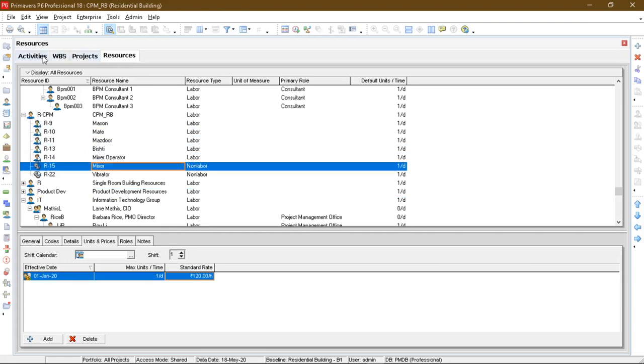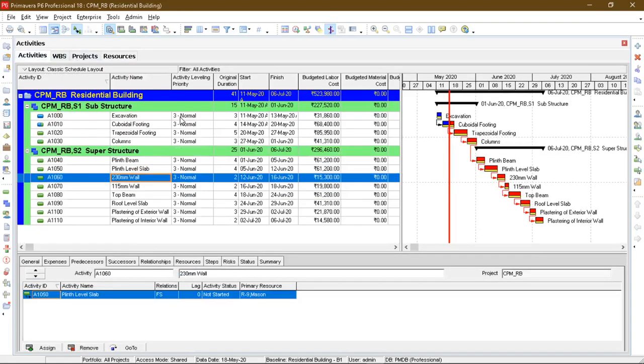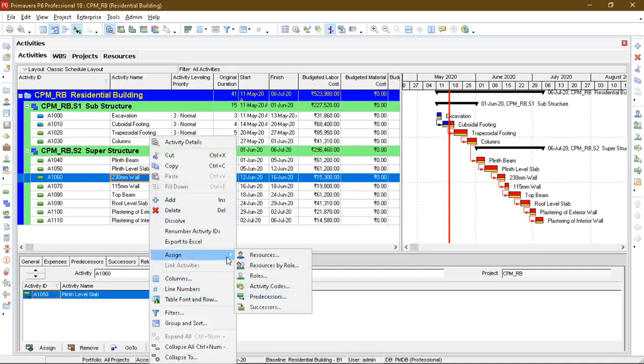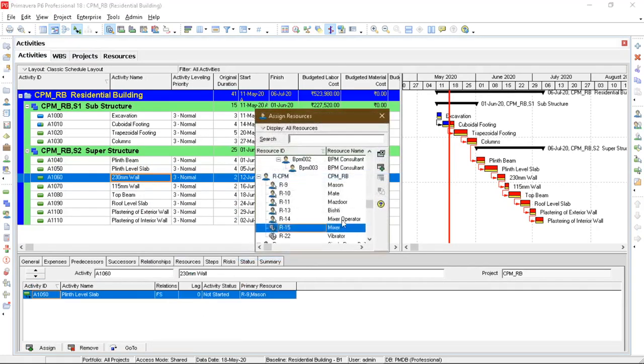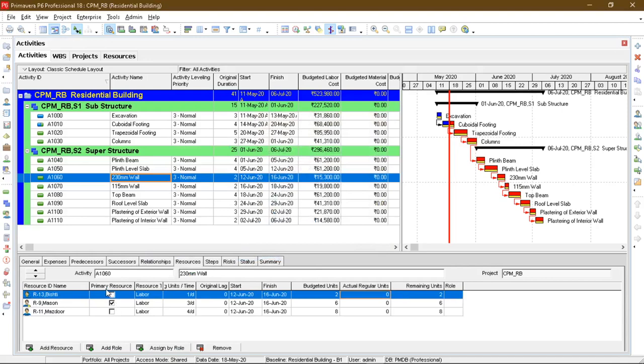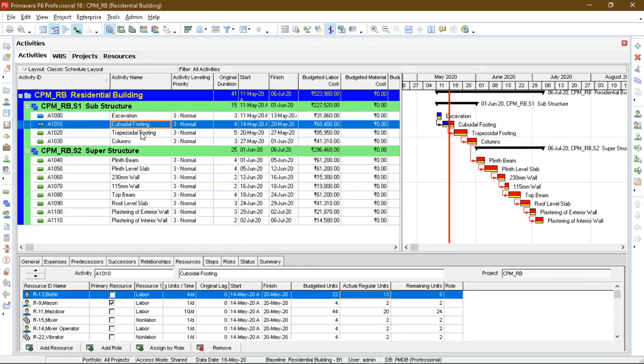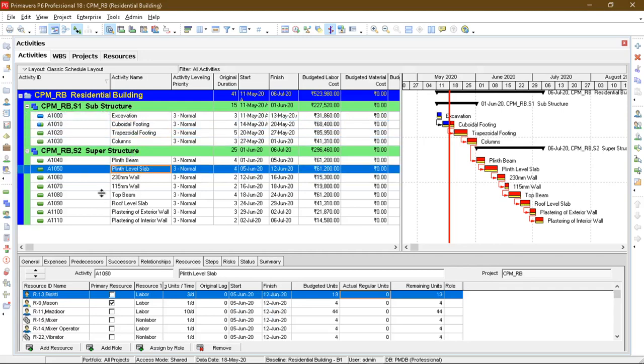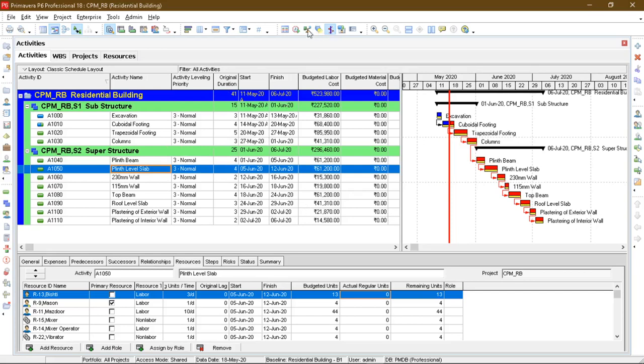The resources: mason, mazdoor, mistri, 120, 80 and so on. Then coming back to activities, I have assigned the resources using this assign resources key. As you can see in the resource tab I have assigned resources for each activity as per the problem. Then after assigning, I have defined a number of resources which are used. As you can see: three per day, one per day, ten per day for each activity.